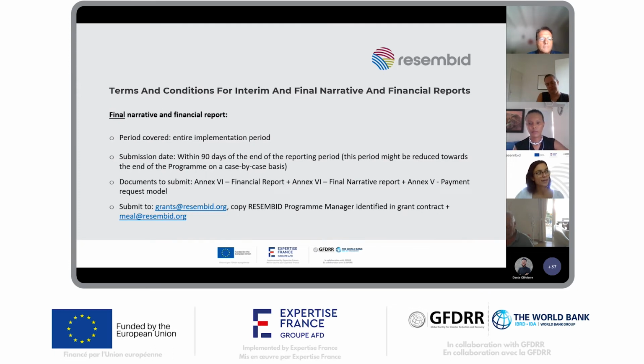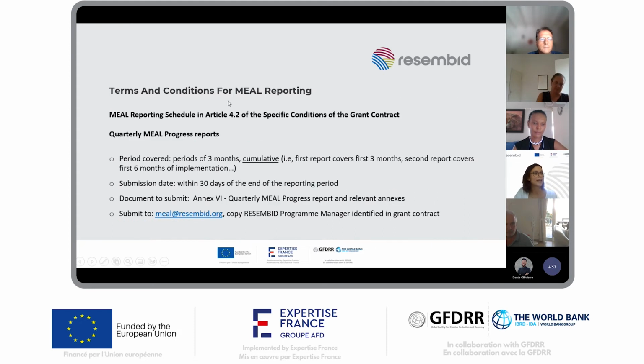Concerning the MIL reporting, next slide, please. Marcia will later on guide you through the MIL report. However, here are the terms and conditions on the MIL reporting. Those reports have to be submitted quarterly, so they cover a 3 month period, and they are cumulative, which means that the first MIL report would cover the first 3 months of implementation, the second one the first 6 months of implementation, and so on.